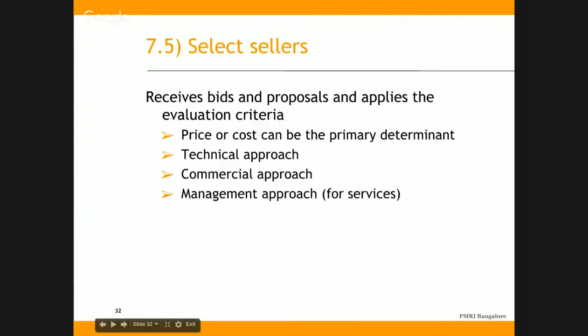Select sellers: receive bids and proposals, and apply the evaluation criteria. Price or cost can be the primary determinant, but it doesn't mean that we give weightage only for that. We should give weightage for the technical approach for the project, the payment terms and the commercial approach, and the management approach for services as well.